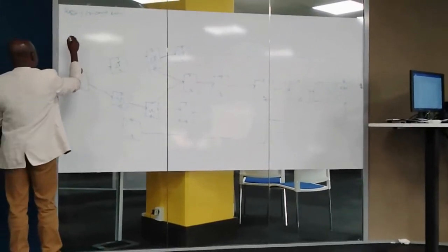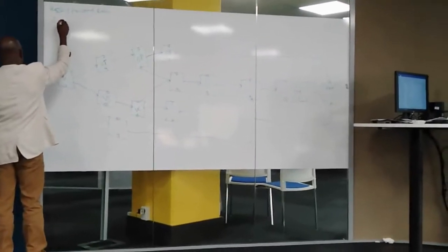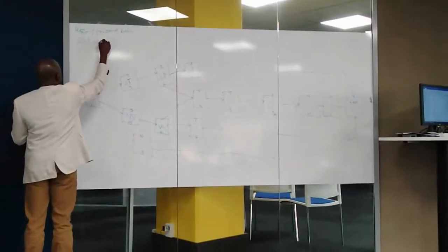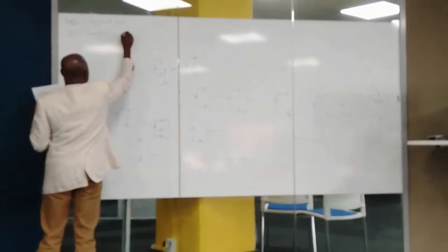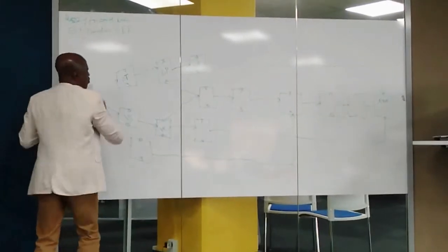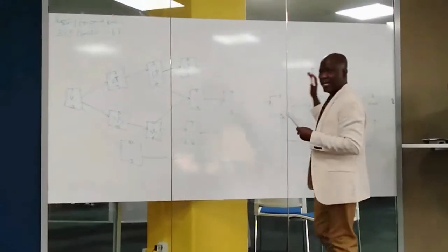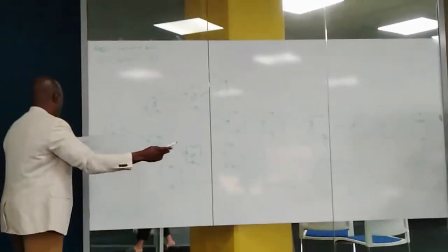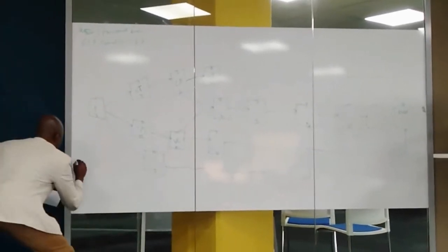the rule equals ES, early start, plus duration equals EF, early finish. When we move like this, we're looking for early finish, right? You remember yesterday, right? Yeah. And so the formula is ES plus duration. When we're moving backward, that is the backward pass. Coming back to calculate back is going to be the backward pass.